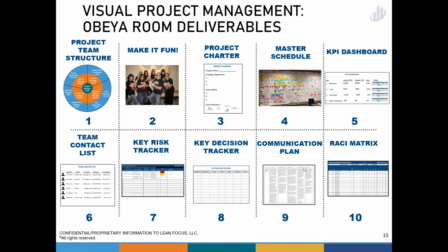The communication plan, right? So what are the daily, the weekly, the monthly, the quarterly elements to how we're going to communicate and how we're going to engage, right? So the daily stuff, the weekly stuff is going to be interactive. Weekly, there may be filling out a simple 4x4 one-pager: key accomplishments, key challenges, what's up for next week, what are the key risks that we're tracking, and our plan to clear it. Something to that effect so that we know what's going on.